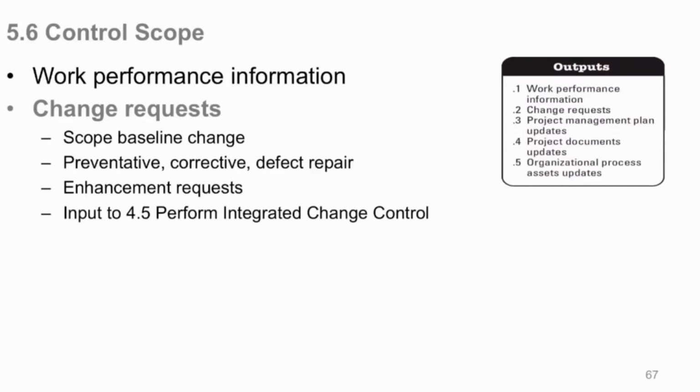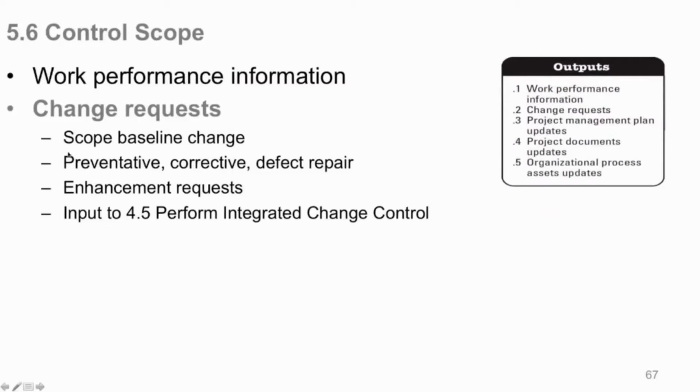Never accept anything that's not in the baseline. So maybe you're lucky and they'll say, okay, regardless, I'll take it, update your scope baseline. And at that point, you would not impact cost or time or schedule because it's already done, and luckily they said, okay, that's good, just change your baseline and be done with it. Change request, preventative correction, defect repair would be there. Enhancement request, here's where the instance of enhancement requests come in.